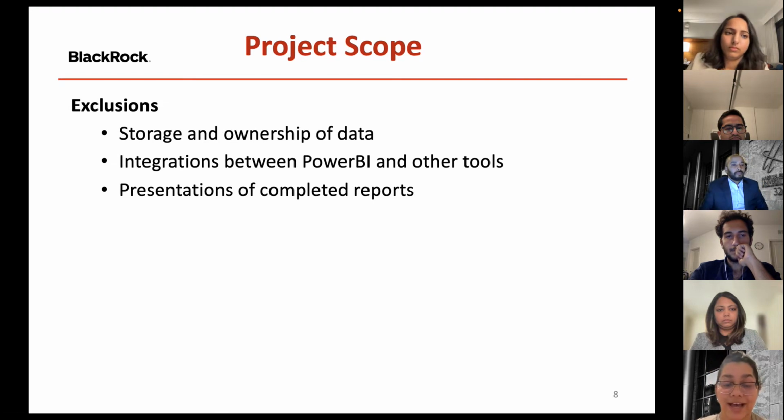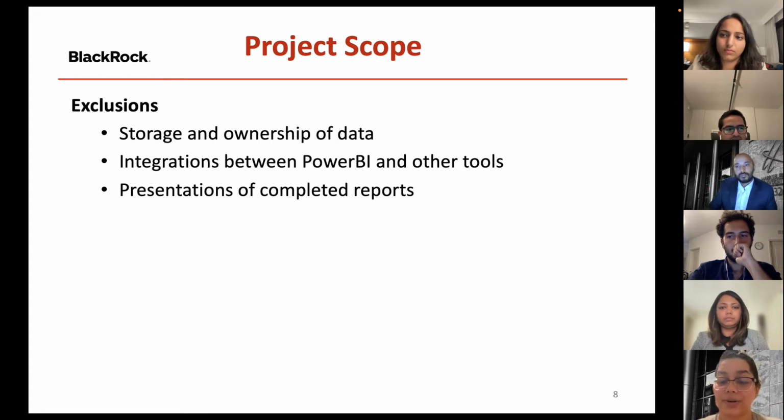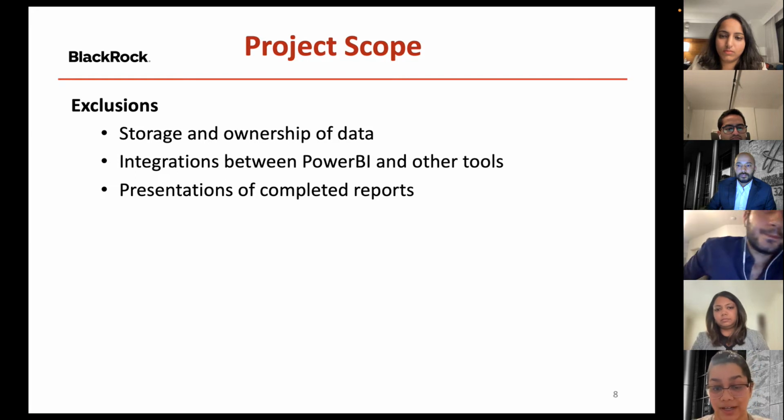Some of the exclusions that we have are that we are not going to be storing or owning the data that we use. We are just going to be representing it. We are not looking into integrations that Power BI has with existing tools used by the company. Maybe down the line, but as of right now, that is not our priority. Our priority is showing the data in a more user-friendly way.